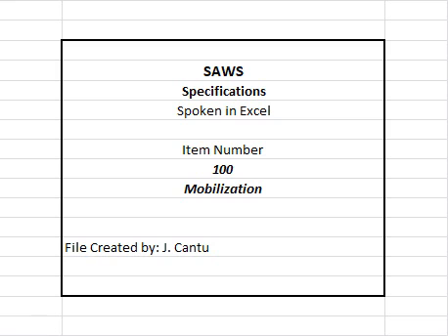Wastewater gravity main facilities. Pipe: 6-inch diameter or greater, rounded down to the nearest whole foot. Manholes: includes base and cone section, risers, rings and covers. Excludes risers for FRP unless proper stations are provided noting location. Wet wells: excludes cover.